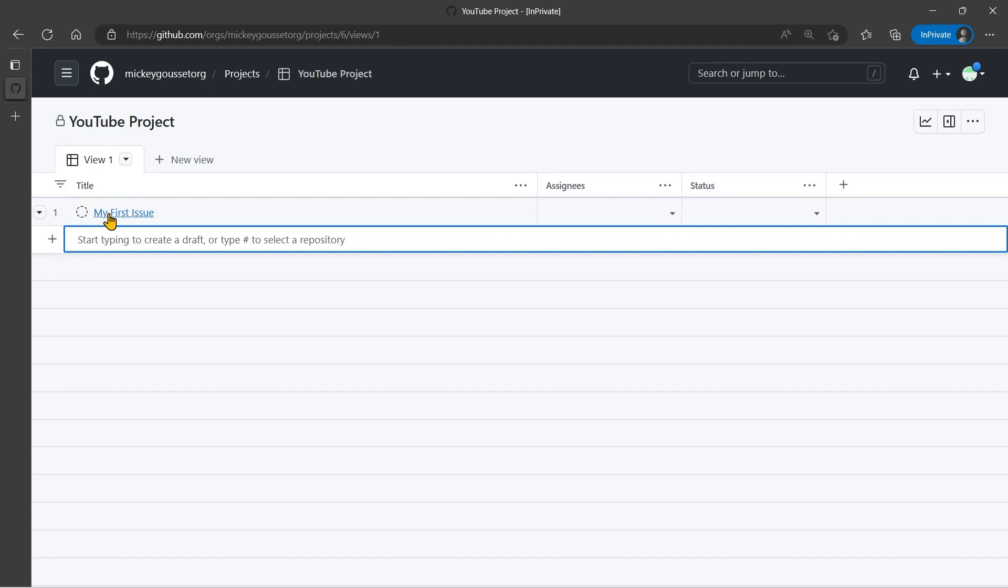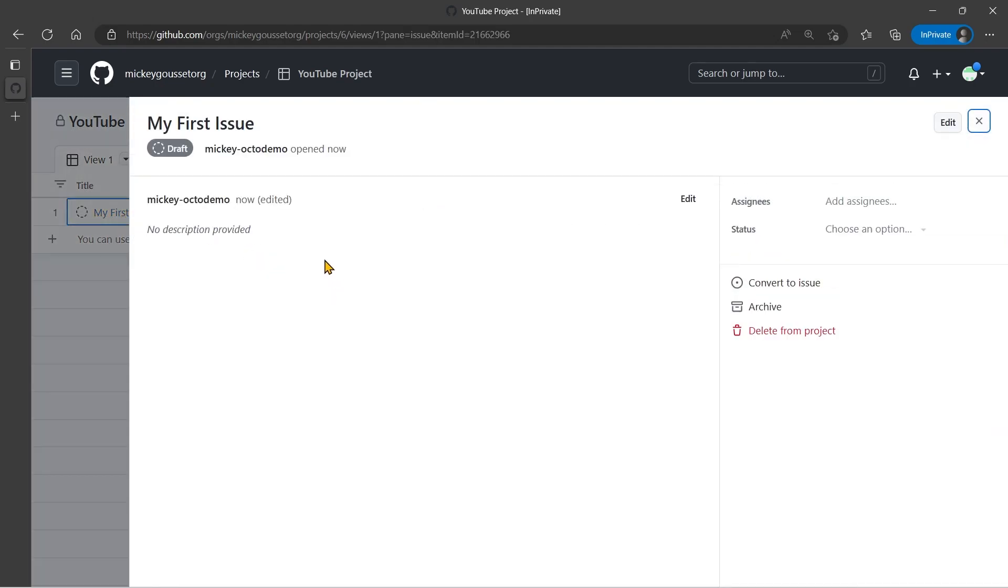And this is a draft issue. I can click into that draft issue, and all I can do with a draft issue is give it a name and give it a description, but I do have the ability to convert it to a real issue, which we will do in a future video.